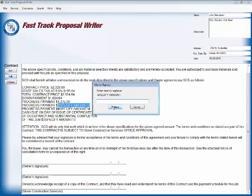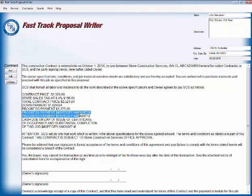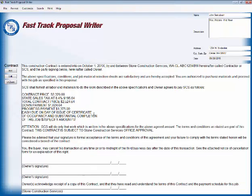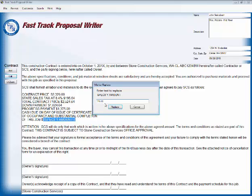And now there will be one more payment on this job. So we're going to cancel this editing and we're going to get rid of these two progress payments that we've got here. And we do that simply by highlighting them, hitting the delete key, and going right back to edit, which is specify the enter text to replace, which is the final amount for this contract, which will be $125.00. Your final payment on any contract in construction, remodeling, new home, whatever it is, should be about 2% of the sales price of the job. And there's a whole bunch of reasons for that that can be found in both the markup and profit book and in the profitable sales book that you can find on our website. So we put in the $125.00. This is a little more than 2% of the sales price of the job, but it's a small amount.